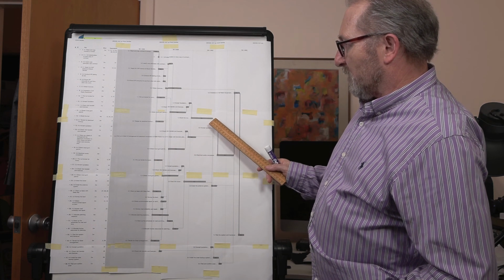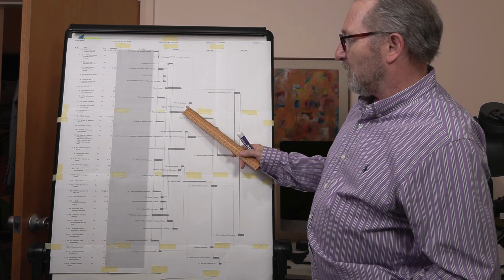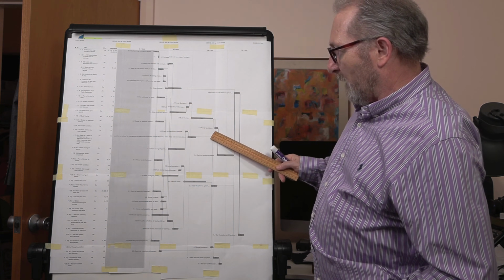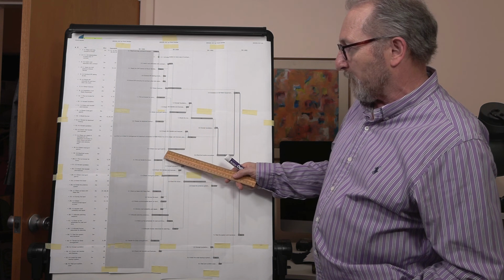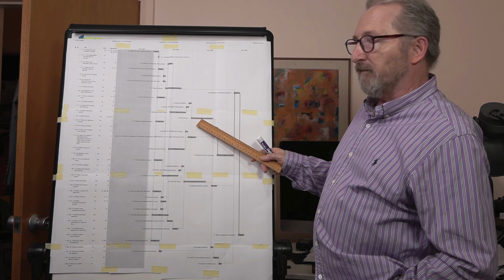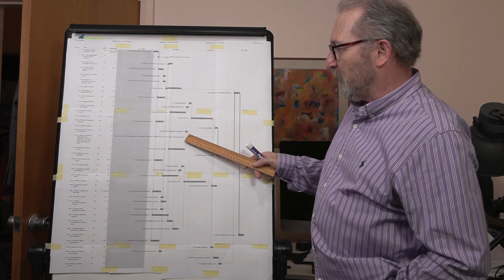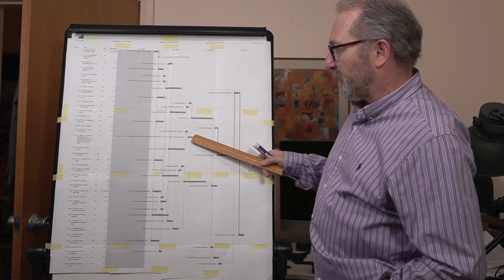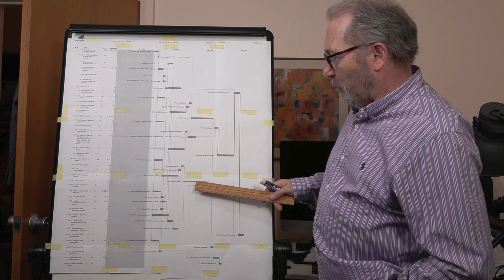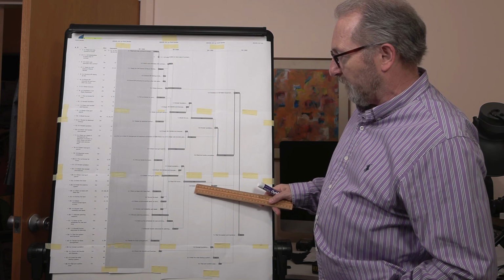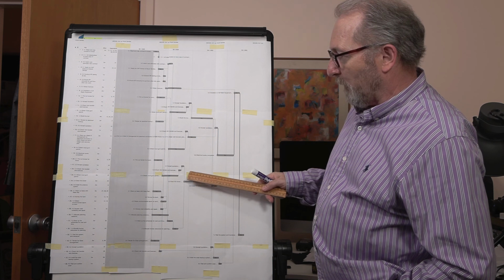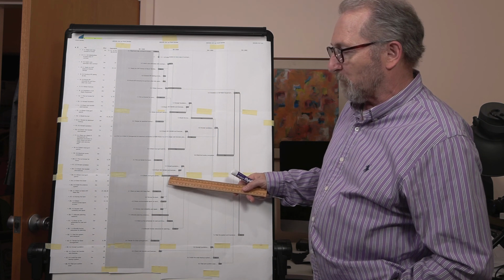And the reason is that I've got 8 weeks, 1 and 2 makes 10, 6, 16 weeks, and I'd been comparing it against this part of the path here, which has 3-week activity in lieu of this 8-week activity. Therefore, this has a lot of slack time. It has 5 weeks of slack time on that path. What I hadn't looked at was this other activity down here, which comes from the same point. 8 weeks, 1 week, 1 week, 6 weeks.